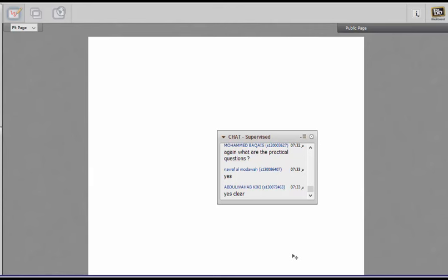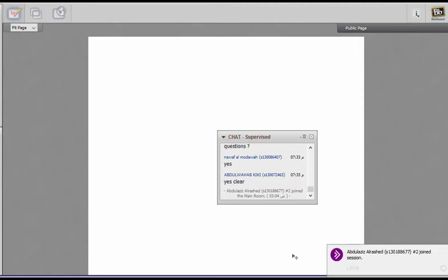Just to remind you, it will be a very simple question. What you will have to do is you will see whether you have been asked to make a process-based or a product-based WBS. If you have to make a product-based WBS, extract all the nouns from the case study, and then look what is the hierarchy of these nouns, which nouns become the parents, which nouns become their children, and then so forth, down and down.